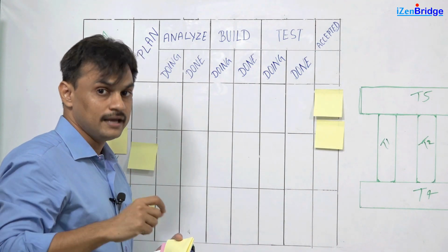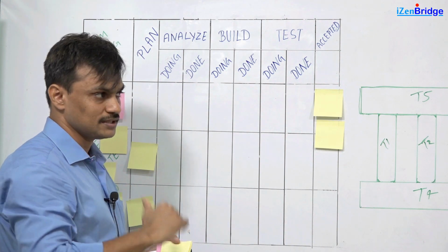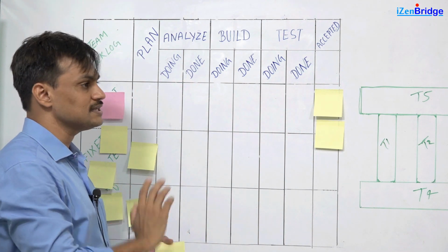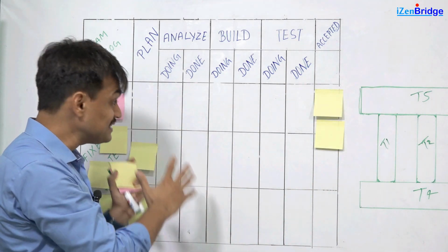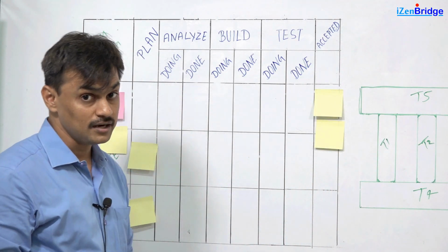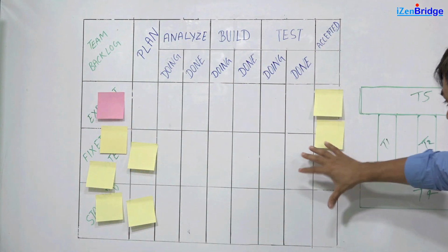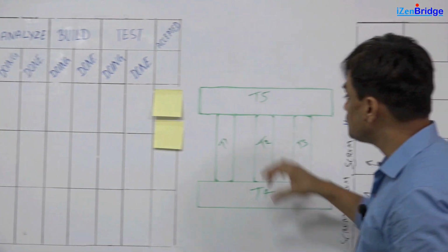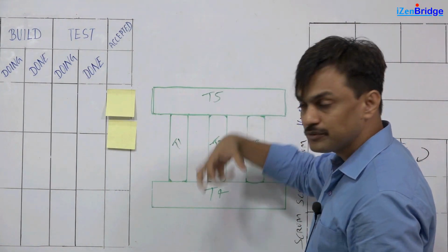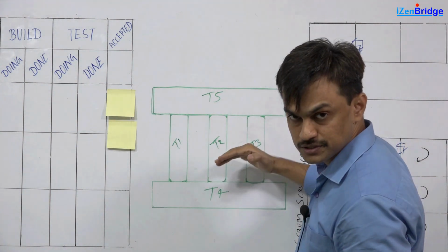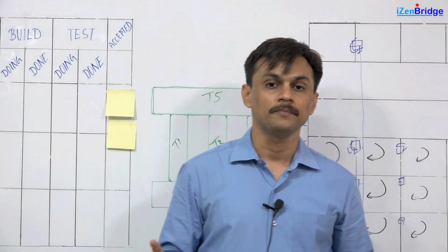And that is the reason it may use fixed date class of service frequently. So rather than saying in sprint 2, we can say by week 3 this should be done, and it may get started on week 1 itself. And that's the flexibility these Kanban teams are getting. Now, if you see across, this kind of structure, in my personal experience, I find useful when you are picking up the work or providing services to other teams. Now, this is something we looked at, how a Kanban team can operate in SAFe.